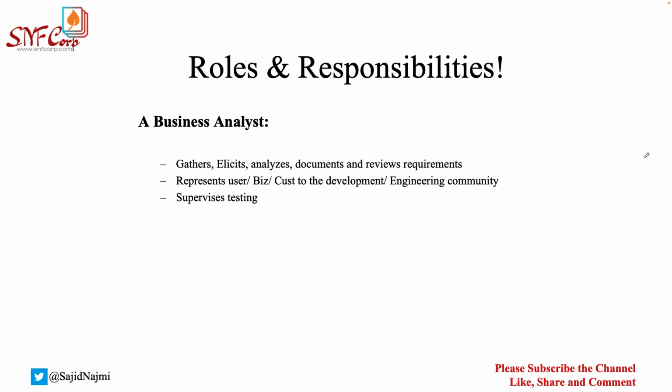You have to document whatever requirement you have collected from the business, and then you will review all those requirements with your engineering team, with your manager, with your peers, with your business, and finally you have to take approval from the business. On what basis will you know this requirement is final and there will not be any changes? The basis is that you have to baseline these things. And what do you mean by baseline?